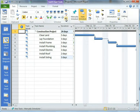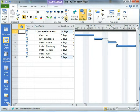In Project 2007, the closest thing we had to this would be PERT analysis, which is really not the same. With PERT analysis, we could do an optimistic, pessimistic, and most likely scenario for what an activity would take, what the duration would be. And we could do the PERT analysis, calculate it out and take a look at it.